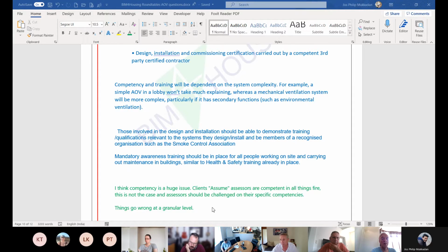So the method statement of actually doing it, and the records, maybe photographs of it being installed. We're doing a project at the moment for one of the Oxford colleges, where they're installing new windows and taking photographs of the installation process so that they can evidence what they've done. So I imagine that's the sort of methodology. But what you're saying is the certified person could then come in and just check it.